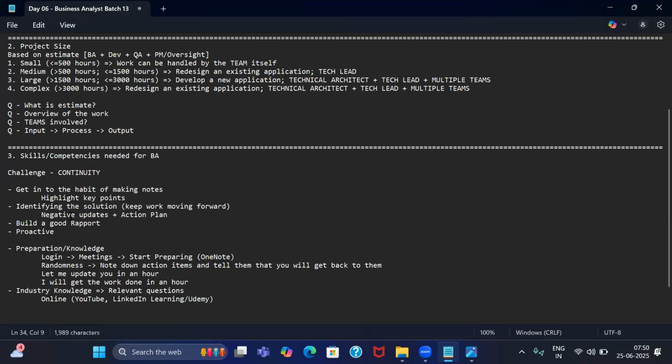Why we could not finish the work on time? Because there was an unexpected server breakdown that happened. And what are we doing to fix it? We are working with infrastructure team to get the server back up and running so that we can continue the work. And what is the tentative new timeline? So we are expecting to finish our work in next 4 days.